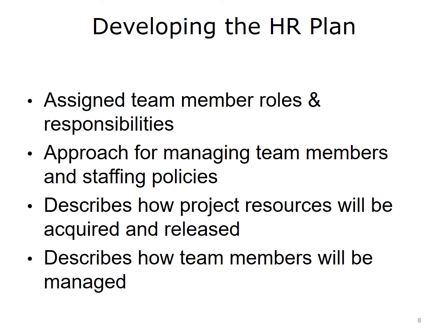There are 3 key inputs that assist in the development of an HR plan. These are enterprise environmental factors, organizational process assets, and activity resource requirements. It is important to consider environmental factors in the enterprise you are working within, such as politics, budgets, competing priorities, and other factors unique to your working environment.